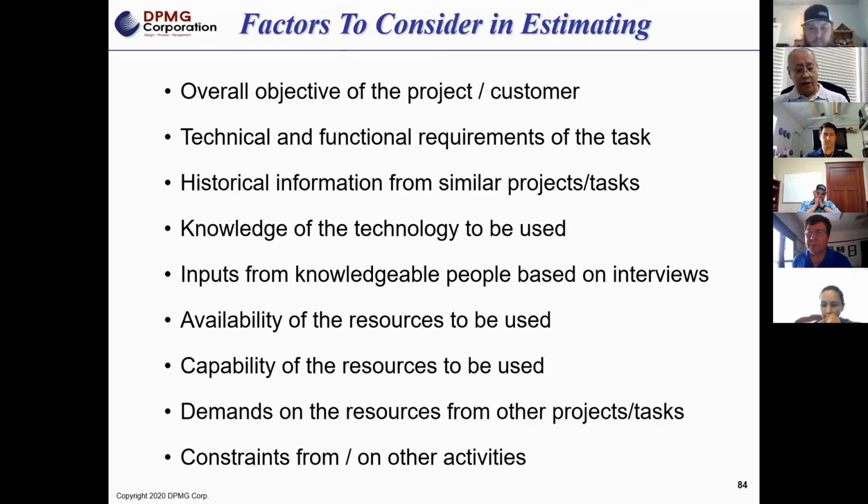You need to look at constraints when you look at seasonality in a business, right? For example, I'm going to use accounting. Accounting typically gets tied up at year-end closing, and you really can't tap anybody from an accounting perspective. For those of you whose seasons are attached to harvest season, there's the availability of certain people, because of harvest season, or the preparation for harvest season. So if I've got my mechanics, my maintenance folks, those folks are going to be busy prior to the harvest season because they're preparing everything for harvest season.